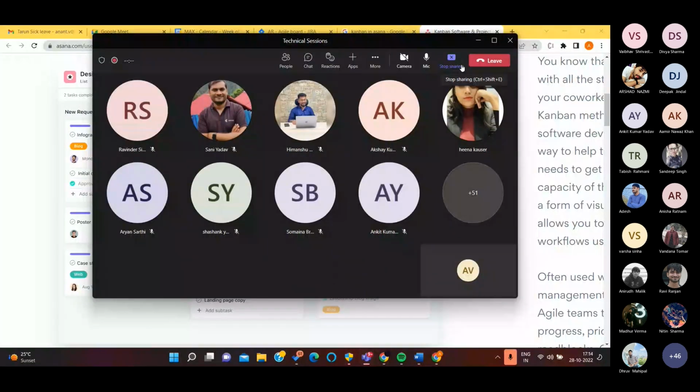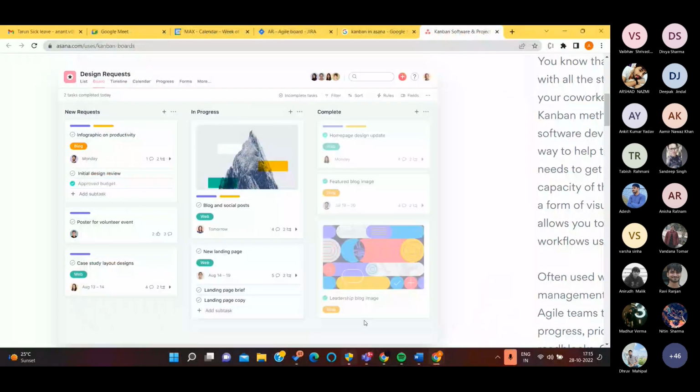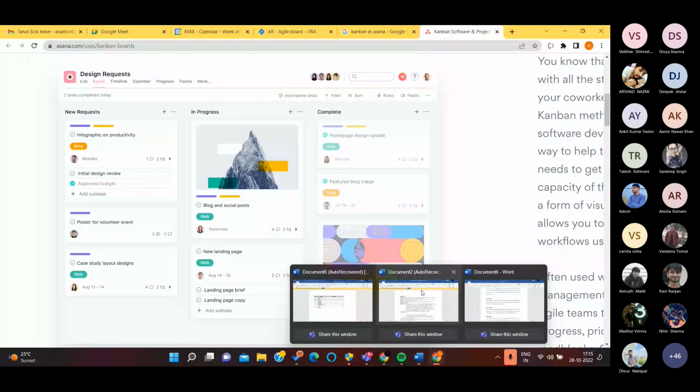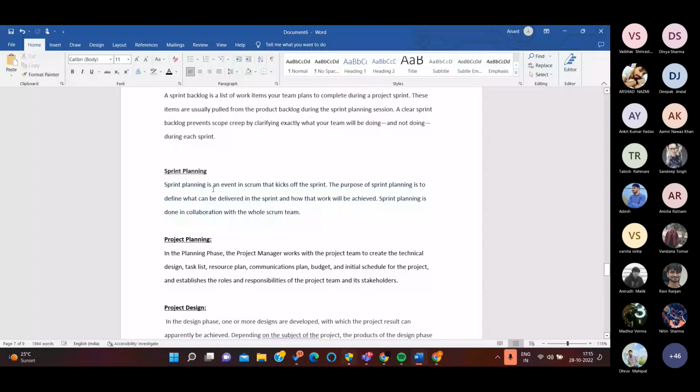Okay, great. So now the thing that Shashank mentioned earlier is sprint planning. So what exactly is sprint planning? Before the start of a sprint, there are chunks of work that are taken down by the product owner and project managers, and it is decided that this is the chunk of work that we will be completing in this particular sprint. Depending on their priorities, values, and the estimation of the effort required, that chunk of work is taken down.